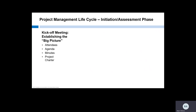The purpose of a kickoff meeting is to gather all of the team members and applicable stakeholders to define the elements of our big picture. This is an important step that should not be skipped. The kickoff meeting not only enables you to get the most efficient answers to your questions, but it also helps everyone understand the who, what, and how from the beginning. A meeting agenda is a must and should include discussion of all of our big picture areas. Minutes from the meeting are also necessary — determine who will be responsible for meeting minutes in advance. During the meeting, you may want to consider using a project charter as a tool to document each element. If you do, take time to orient the team to the charter and its purpose.